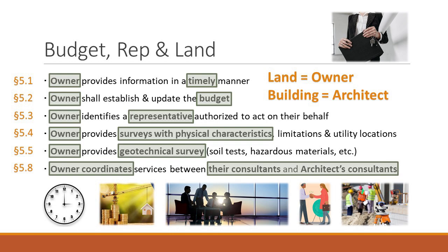And so at certain points during the course of the project, the parties have 5 criteria. It's cost, safety, performance, management, blanking on the 5th one. And there's a set of parameters that are spelled out as to how the contractor can earn a bonus if they have met the certain criteria for the incentives. And that's an exhibit to the contract.